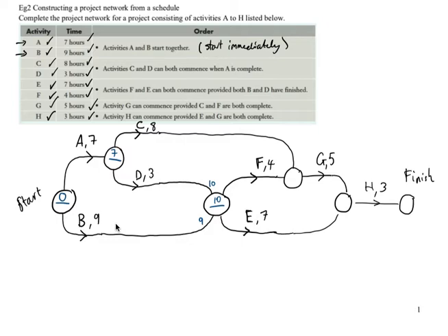Here we can either have a 15 or we can have a 14, so we choose a 15. And then here it's either going to be a 20 or it's going to be a 17, so we choose the 20. And here it's going to be a 23, and that's it. Then we do a back scan, and we'll do that in red.